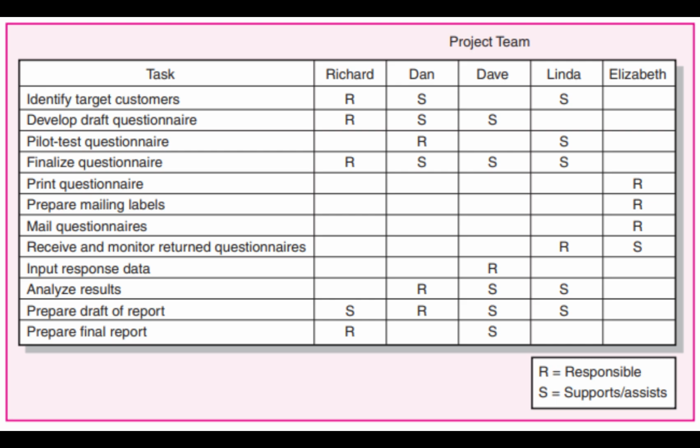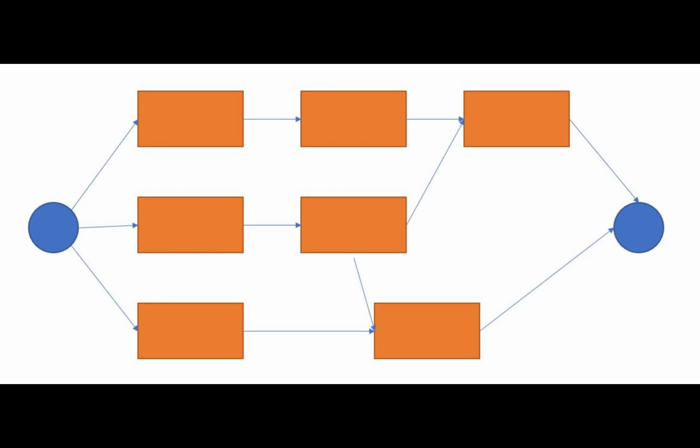What is the responsibility matrix? Also known as the linear responsibilities diagram, it summarizes the tasks to be performed and who is in charge of what in a project. In this matrix, the letter R is used to identify the member responsible for the coordination of efforts of the other team members who would have been assigned to a certain task. It also ensures that the task is finished. The letter A is used to indicate who are part of the team, which will support and help the person in charge.